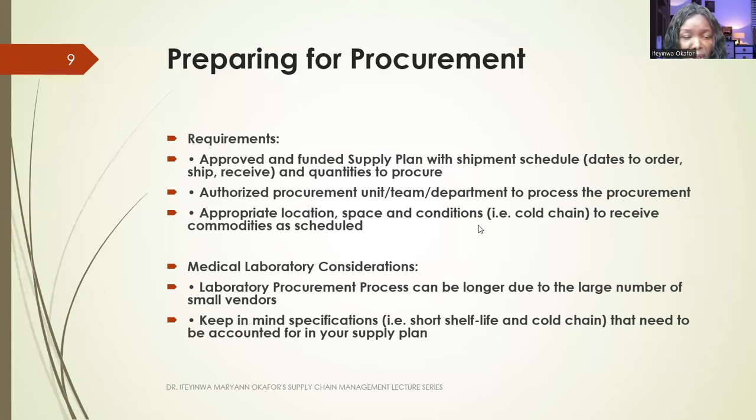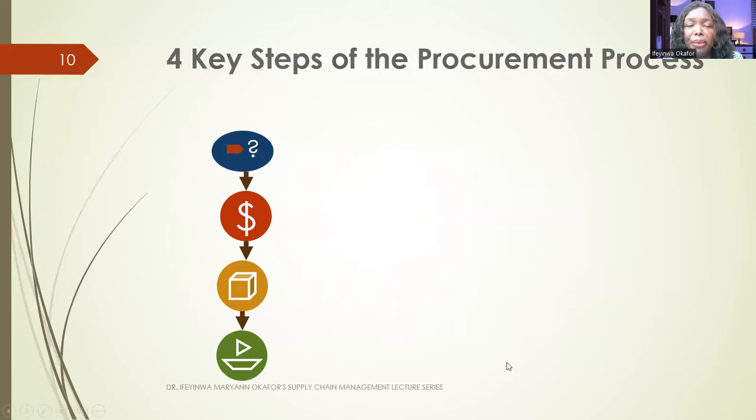And you have medical laboratory considerations, like the laboratory procurement process can be longer due to the large number of small vendors. Keep in mind specifications, that is short life and cold chain, that need to be accounted for in supply chains. You need to keep in mind special conditions with regards to some medical laboratory products, their shelf life, and if they are cold chain.